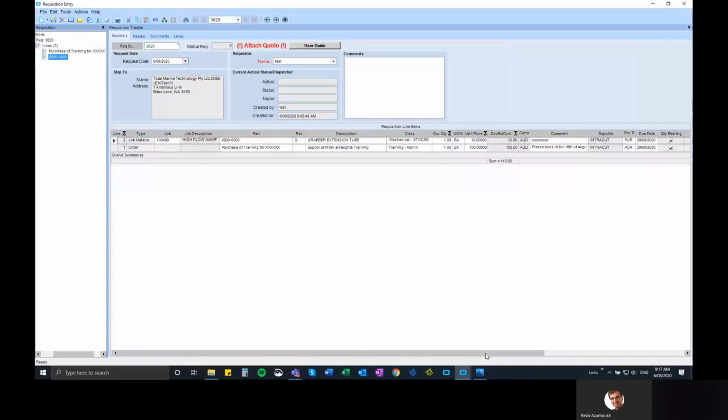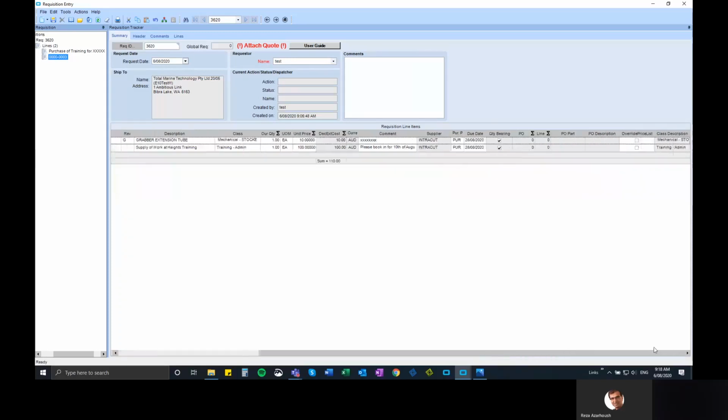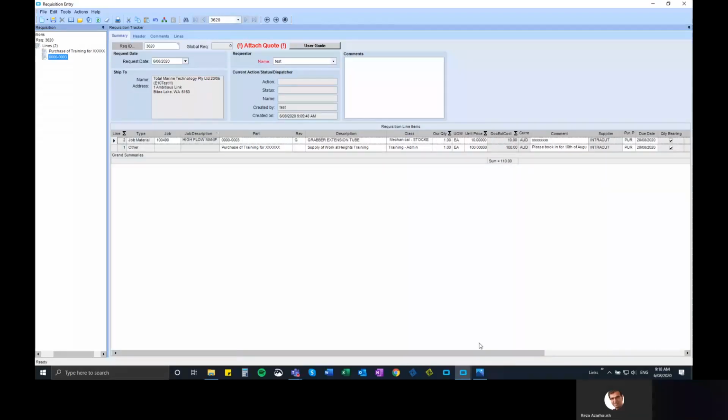That's handled by the system on the side. Once it's approved, it goes into purchase suggestions, and then the purchasing officers will group suggestions from everyone, from requisitions, from other jobs, from other requirements together, and then send out a single PO. So a single PO may be batched together with your items as well as somebody else's items, and that just provides efficiency and helps to reduce costs through volume purchasing with our vendors.